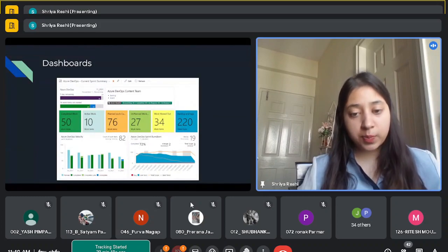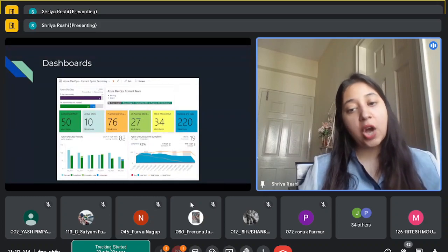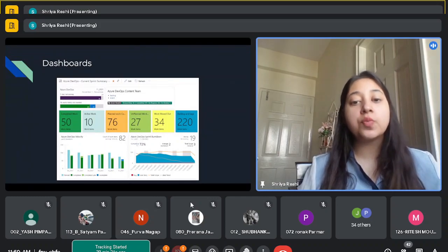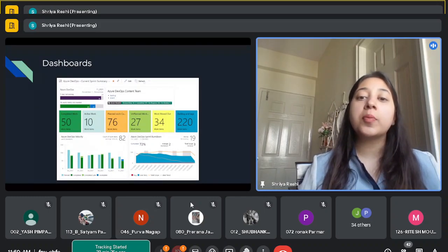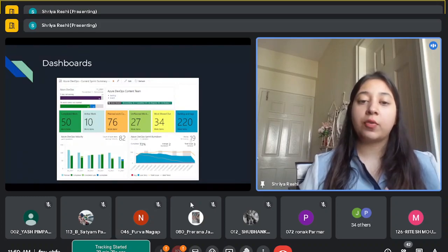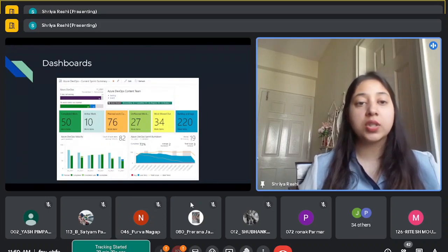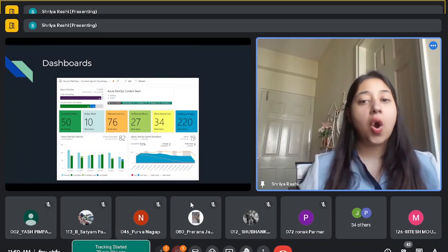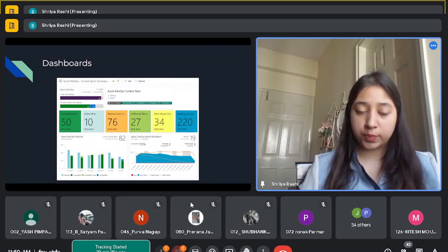when you started the sprint, how much work did you have, and how much have you completed to date. So they have completed 72% of the work. It is used by product owners to check if whatever they have planned for the sprint is going smoothly or not. Are they good to close the work by the end of the sprint, or is there something in danger? Any doubts still here?